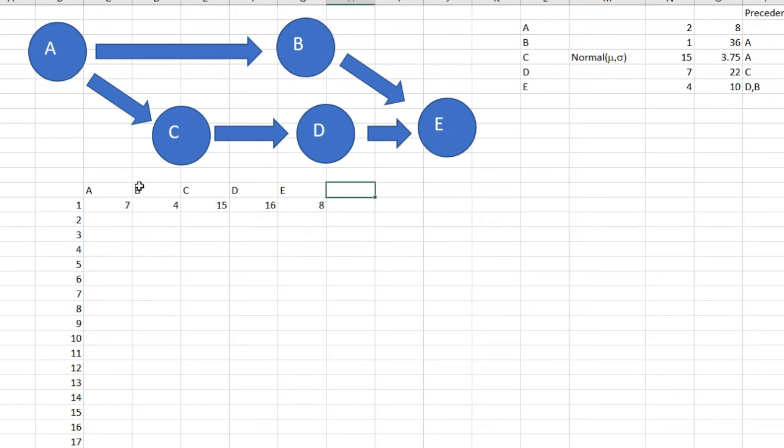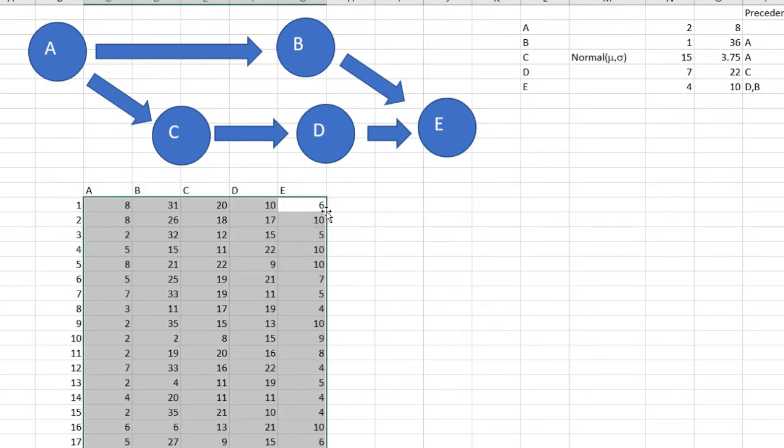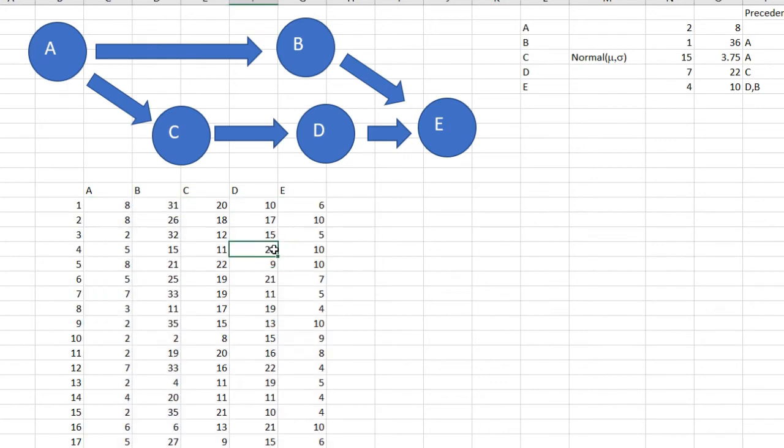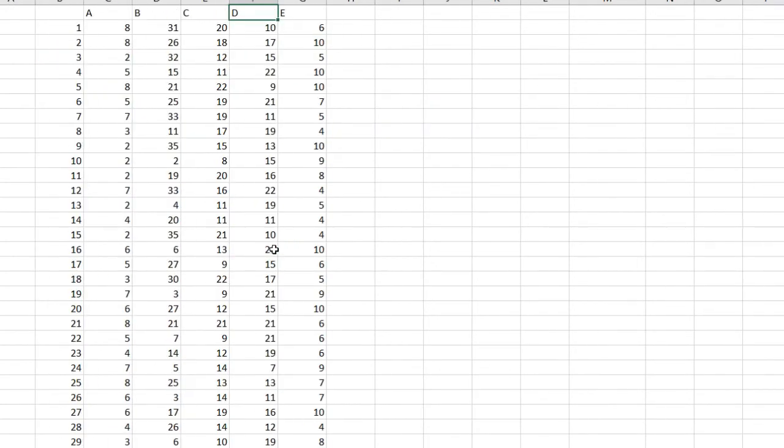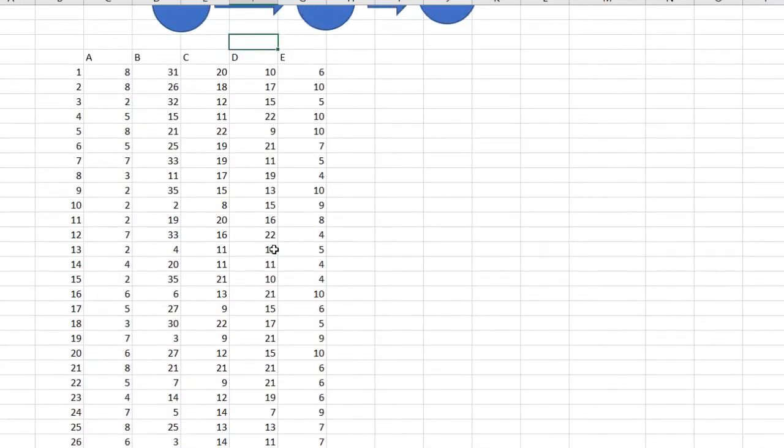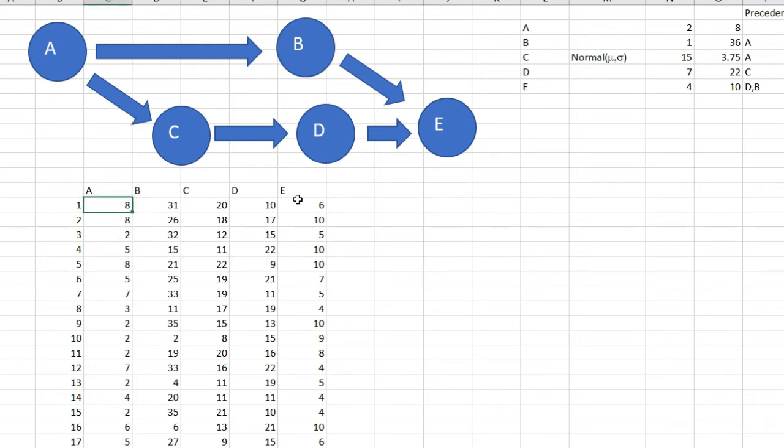So this will generate the activity times for all of these projects. I can double-click and I will get 10,000 of these activities generated. Now the second step is I need to build this diagram, this chart here. I'm going to start with activity A which is already available, so I need to replicate it.